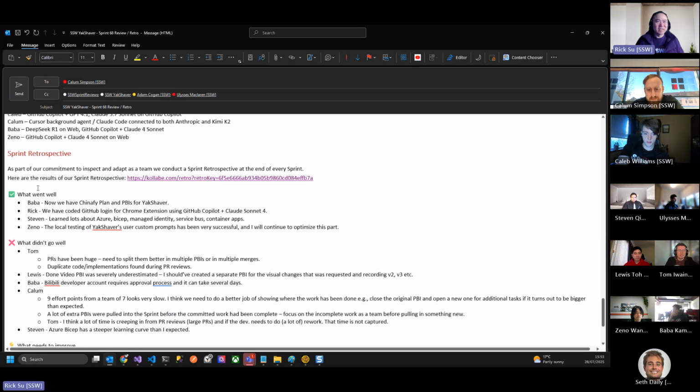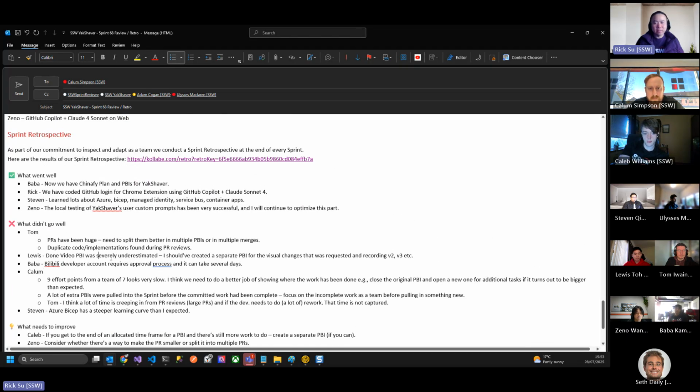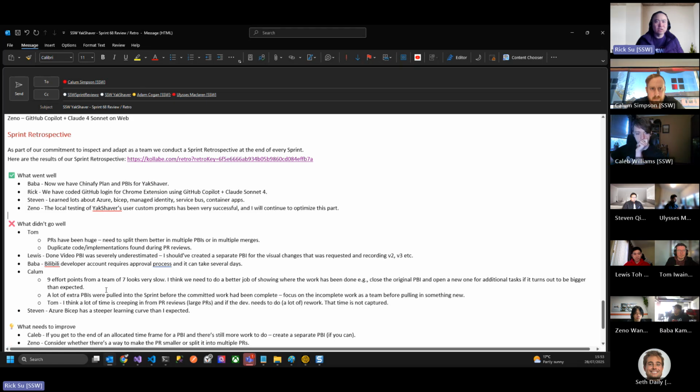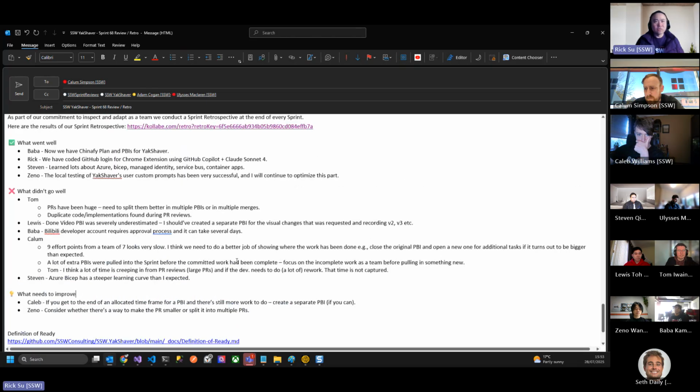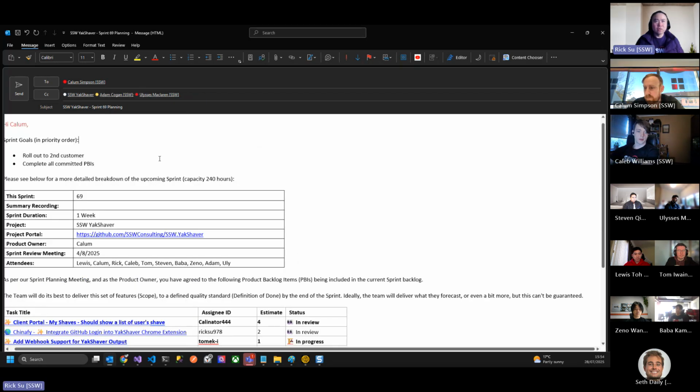All right, so let's get on to the retro. Quick retro. Overall, the team has underestimated the PBIs that they were doing, and it looks like we haven't done much in the sprint. So what we decided to do is, if there are additional PBIs or tasks that you realize need to be done, create a separate PBI instead of sticking it all in one go. So we should mark off PBIs that are done and then create a separate PBI for additional tasks. That was the plan. So that's overall retro. Any questions? If not, then we will get into the planning for next week.